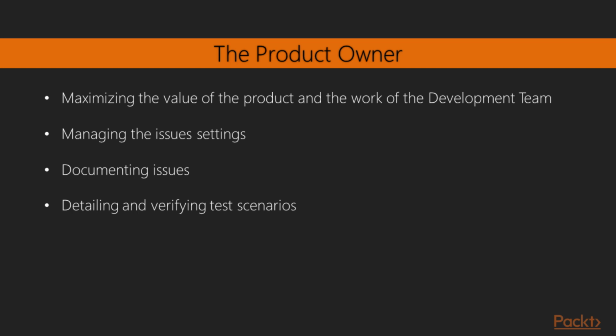Amelia, and of course all of us, can verify the soundness and quality of a user story by applying the INVEST test pattern. Always ensure that every user story is independent, negotiable, valuable, estimable, small, and testable.